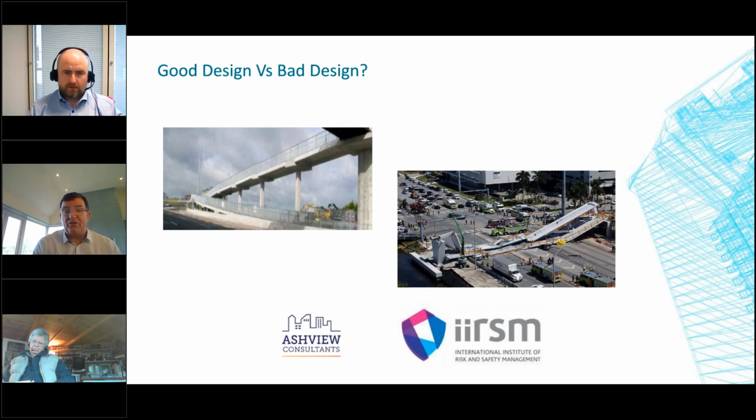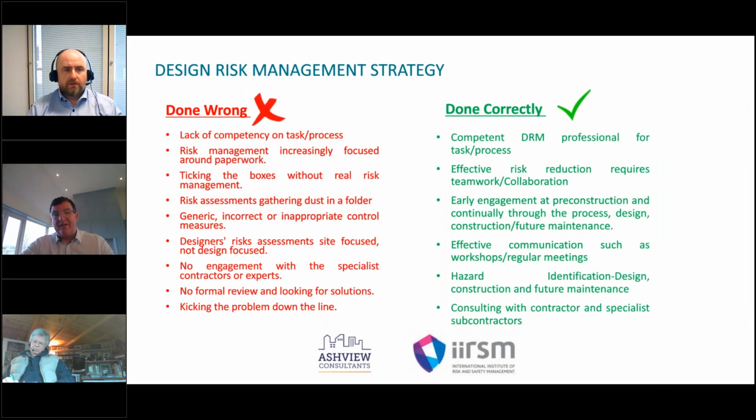And on the right hand side is a picture most people on this call will be familiar with. Without getting into all the detail, what came out of the investigation was that there were plenty of emails going between various parties to say that there was concern, but nobody adopted an authoritative position to say that you're the permanent works engineer, you're the precast offsite engineer, you guys need to be talking, there's something not right here. And we had a bridge collapse. Well, we didn't. There was a bridge collapse in the industry in America.